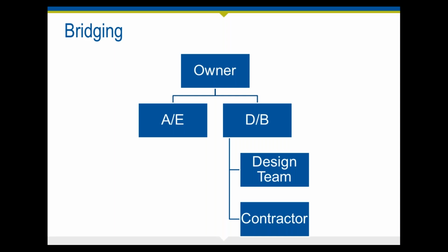So the risk management issues for the architect engineer under the bridging approach vary depending upon the duties and obligations and whether the architect engineer was retained by the client or by the design builder. If the client wishes to retain a design professional separate from the design build team to represent their interests independently from the design and construction process, they certainly can, and that's often called the bridging consultant.